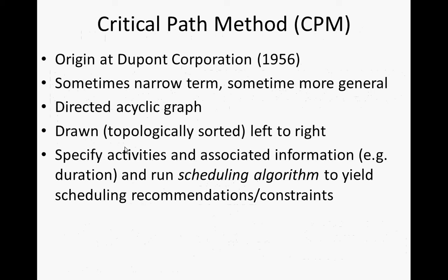So for someone, for example, who's worked on projects in the past, you may have used multiple types of dependencies. For example, start to start, start to finish, finish to start, finish to finish types of dependencies, which have their logic associated with them and can capture a variety of rich situations. We're going to deal with the simplest and earliest form of dependency, which is a so-called finish-start dependency. It's a dependency where activity A has to finish before activity B can be started. Okay. And it turns out that you can elaborate the other types of dependencies so that they can end up using this if required.